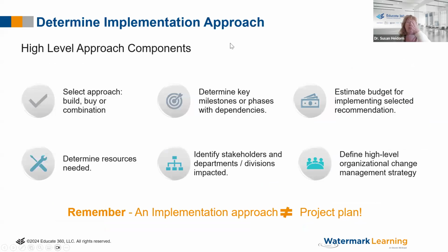Then, of course, you have to implement, and we're not creating the project plan here. We're just saying, at a high level, what is it going to cost and what resources is it going to take to implement this if we say yes to this business case. First you have to have an approach: is it build, buy, or a combination? Are we going to create our own process or software? Are we going to buy someone's? Certainly figure out the resources needed, and whether they're in-house resources or contracted resources.